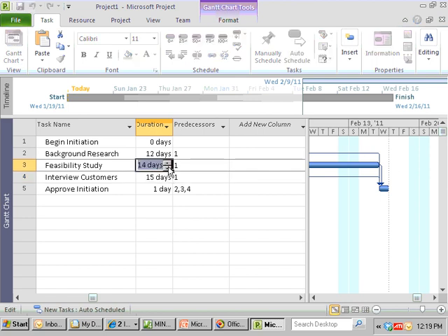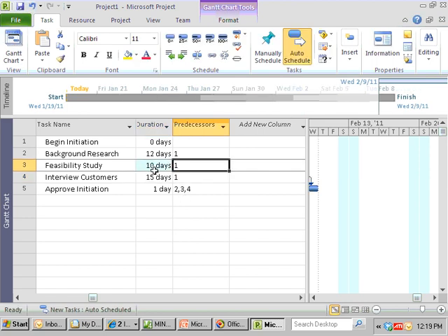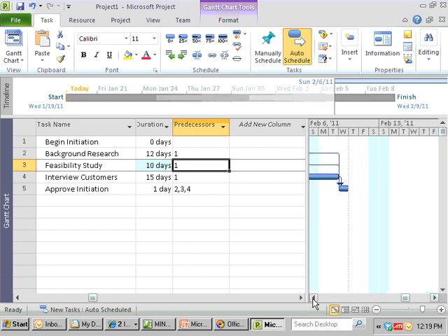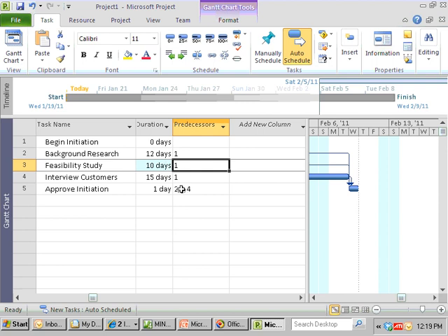So my advice is define the project in as general terms as you can, and don't try to guess when something's going to happen or what the longest task is. Just say we can approve initiation when these 3 are all done, and just choose the latest of them, and don't try to figure that out yourself.